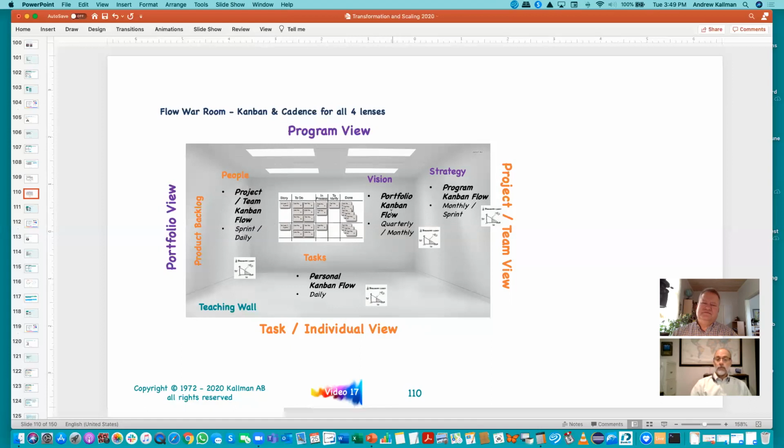We had our vision and mission posted on the wall, and it was important whether it was discussion from the team as far as priorities or stakeholder requests. We would go back and ask, is it a nice to do or a need to do based on our vision and mission? And if it was a nice to do, we had on the backlog board potential next project or other projects that we would put those ideas into.